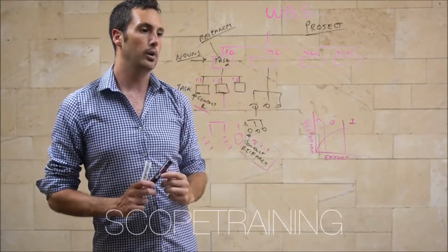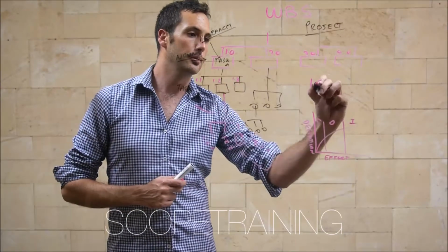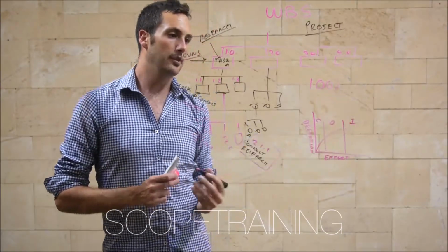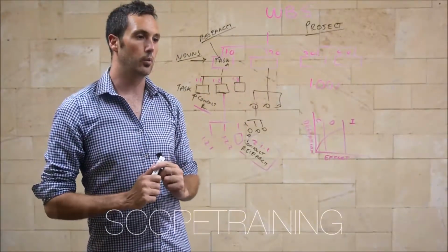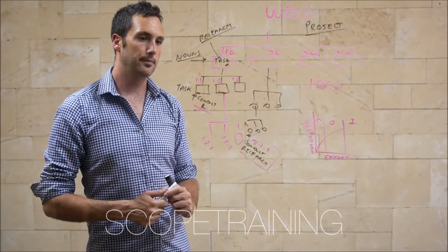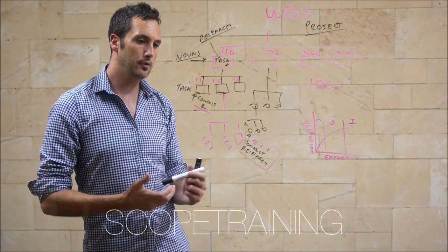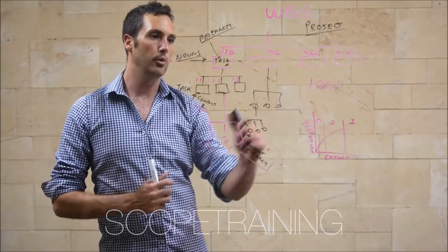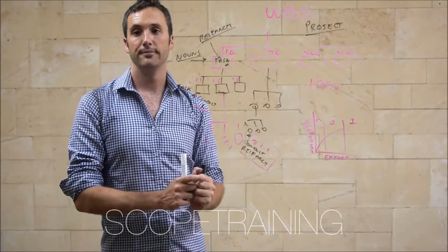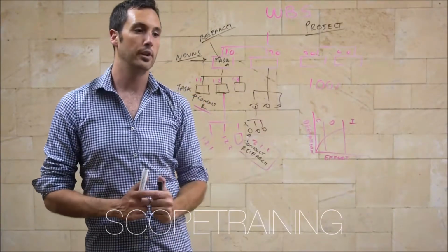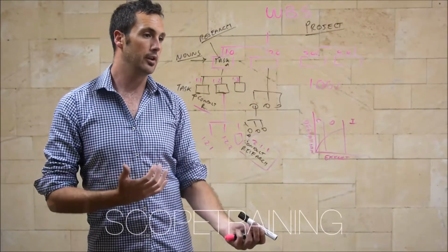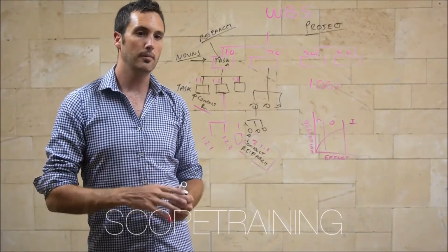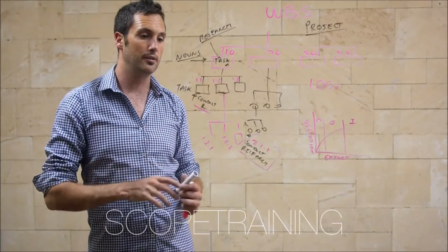There's a rule in the work breakdown structure that's called the 100% rule. And basically it says that your work breakdown structure should contain 100% of the work required to output the project. That means if you've got a task that nicely fits into 2 or more categories, put it in one. Otherwise you end up with more than 100% of the work. And don't leave stuff out, because when it comes to estimating costs and time, you're not going to estimate it.